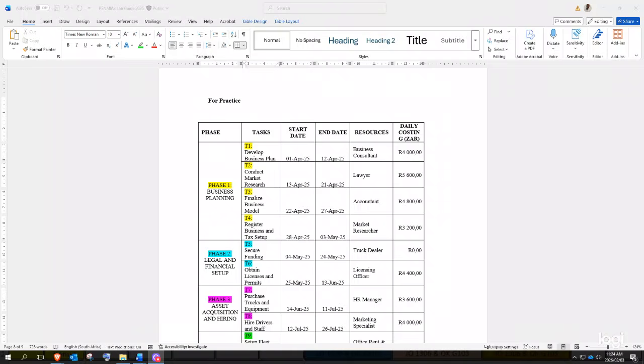So the duration of your milestone will always be 0 on Project Libre, because the approval is instant. So it doesn't take the whole day or 24 hours for the approval to happen. Okay, I'll make an example. When you send money, you get a bank notification immediately after sending it to say your transaction was approved, or the deposit was successfully done, or the money has been received.